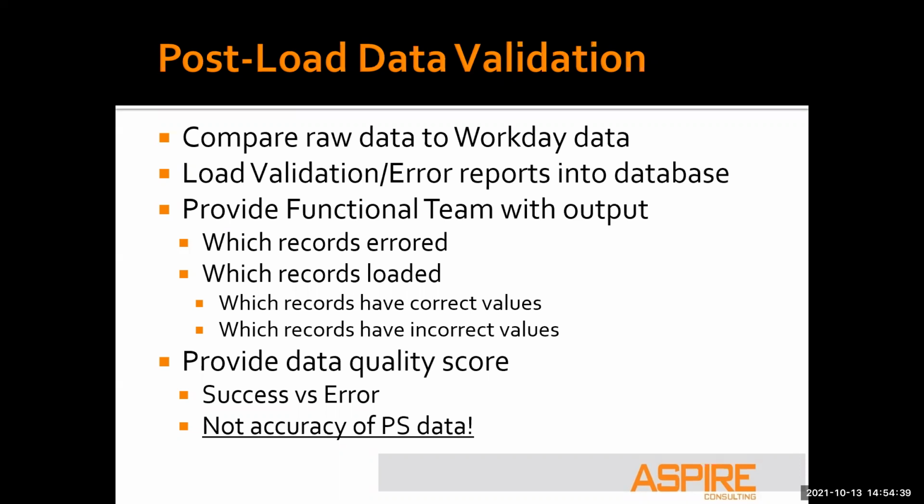We have some scripts that we've built that will take those error and validation reports and bring those back into the database, where we can then merge them together with the initially extracted file, so that we can say, here's what was successful and here's what has a problem, and ultimately give that to the functional team.